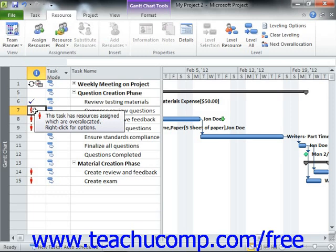you can automatically level over-allocated resources in Microsoft Project. When you automatically level resource over-allocations, Microsoft Project will either delay the start times of tasks, delay the work resource assignments for a task, or split task durations in order to resolve the conflicts. It will not change task assignments or unit values of those assignments. If you wish to resolve resource over-allocation by assigning additional work resources, you must do that manually.